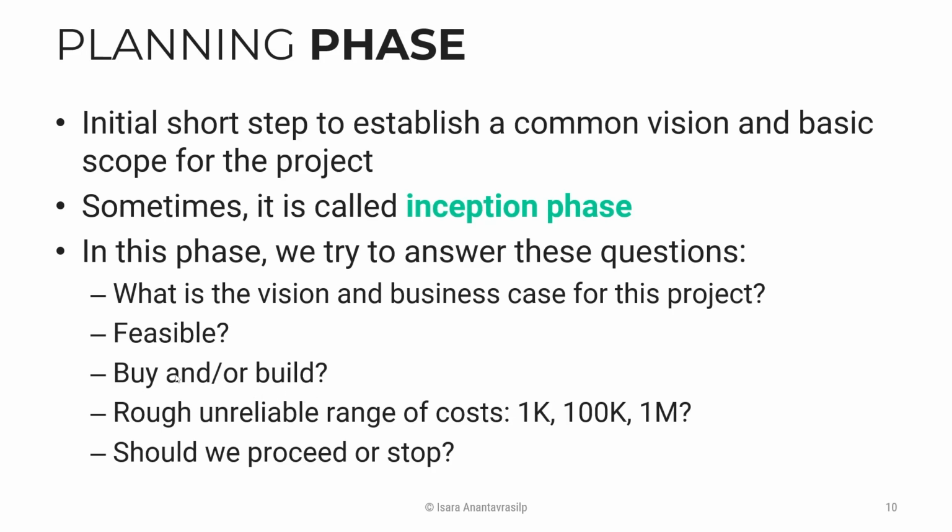You have some idea whether you're going to buy it or build one, and you think about feasibility, and then you decide, should we proceed further or should we stop? In this planning phase, normally people take around a week or 2 weeks, or maybe just a month. If you find something better to do, it is not feasible, then just go on, do something else. Shouldn't invest too much on this.